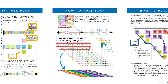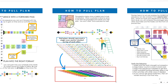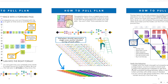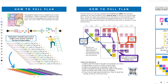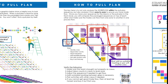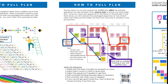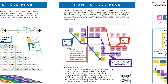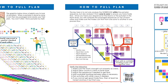A takt plan is nothing more than multiple sequences for multiple zones based off one single pull plan. We don't batch the whole floor or building — we do one representative zone that creates the pull plan, which is then looped into your first sequence and copied zone by zone on the rhythm and stagger. That creates the takt plan, which creates the full production plan.